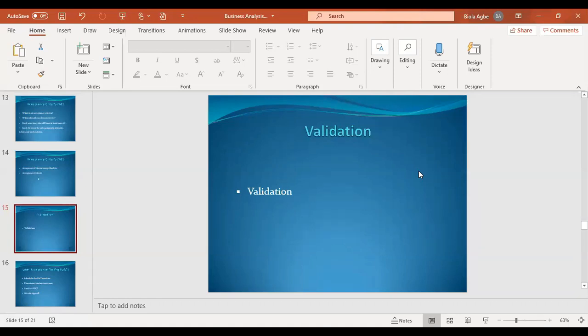You can have the sign off by email. It's usually by email in all the places I've worked, though it depends on the setting. You should have your sign off, not by word of mouth. Even if they tell you they will sign it off for you, when you get back to your desk, send an email saying, as discussed, could you please provide sign off on the requirements, and attach the requirement.